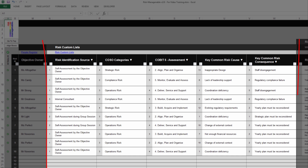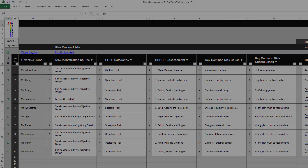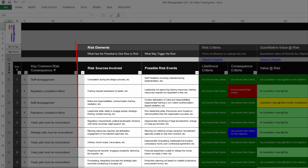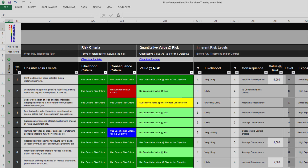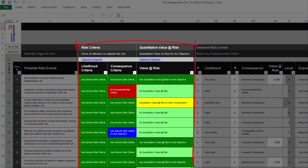The section Risk Custom Lists is where you select an item in each risk custom list which is activated. For more information on the use of custom lists, please refer to the relevant training. The section Risk Elements is where you record the risk sources involved and the possible risk events which may trigger the risk to occur. The sections Risk Criteria and Quantitative Value at Risk are automatically extracted from the Objective Register tab for the objective at risk — this is useful information for entering data in the following sections.